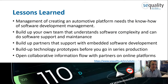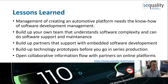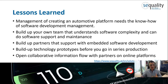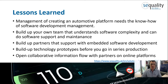Some lessons learned: management of creating an automotive platform needs know-how in software development management. If you build up your team, you should build it in a way that it can do software support and maintenance. It's also a very good idea in this area to build up partners that support embedded software development, as this is a very specialized area where it's good to have specialists who can help. Building up prototype technologies before going into serious production, and shifting your mindset from just buying completed products from suppliers to establishing an open collaborative platform where you also share information with your partners, is sometimes new but very valuable in this area.